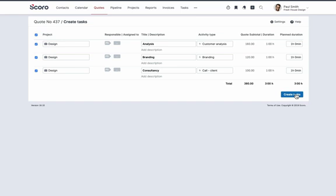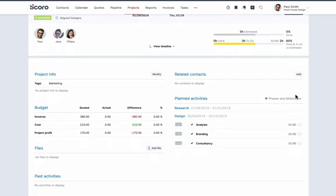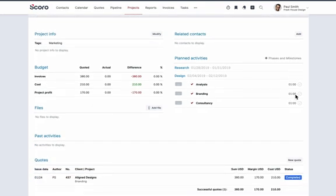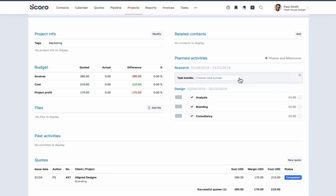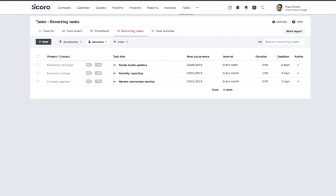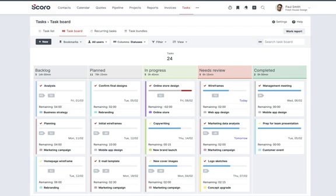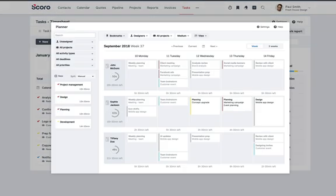When you've created the tasks, they're visible under the project's planned activities. But let's say the project also includes a preparation phase where your team has a kickoff meeting and needs to do some initial work to start the project. To avoid spending time on creating tasks for a project each time, you can create a predefined list of tasks and simply add them to a project when needed. This is called a task bundle and you can set those up beforehand for different types of projects and workflows under tasks. You can also create recurring tasks, get an interactive overview with the task board, or log time using the timesheet view. Once you've created the tasks, you can use the planner to assign the work to your team. You'll always have an overview of your team's availability with the utilization report. You can learn more about the utilization report and the planner in our help center.